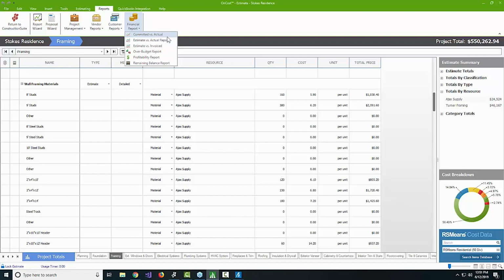Absolutely. Now, as we're looking through these as well, this job was just awarded. Today we generated the contract and we went through and took a look at this. And I'm using air quotes to say that it was awarded. I know you guys can't see that, but the idea here is we'll be running some of the financial reports in a couple of weeks when we get into the QuickBooks portion. But as we're taking a look at some of the information that we have in here, the reports that you should be taking a look at on a regular basis include things like the estimate versus actuals. My expectation is that you guys will be running that report, if not weekly, at the least once a month. It should be reviewed regularly. That's going to help you guys stay on target.